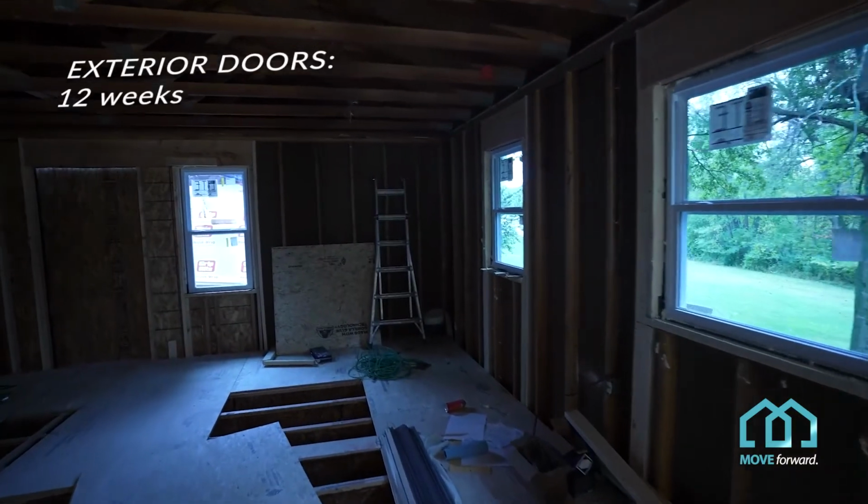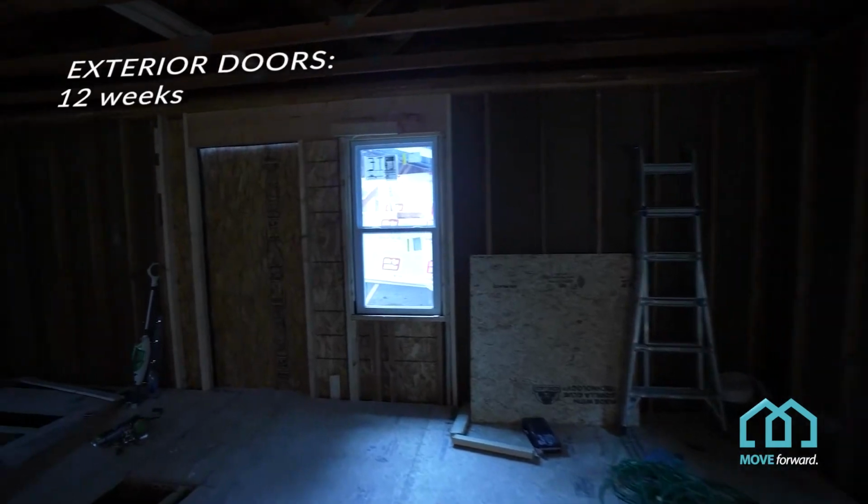windows, 6 months. And the reason I'm laughing is because you'll drive through construction sites, and wood, of course, prices have gone up, but builders and remodelers are putting wood sheathing over the entries for the doors and the windows, and it's funny to look at, but it's not as funny when you think about how expensive it is that they're wasting this wood just as a temporary fix to a huge shortage item. Yeah, I mean, it's a workaround. It's not the best fix for the situation, and we'd rather not, but at the end of the day, you've got to just go forward.